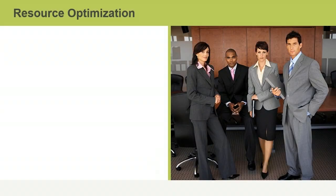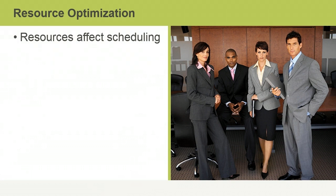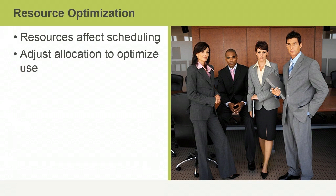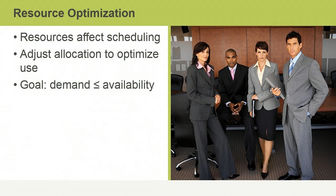This topic covers five tools and techniques used to develop the schedule. The first is resource optimization. The resources allocated for each activity can affect how activities must be scheduled. Resource optimization involves adjusting the resources allocated to activities to optimize both resource use and the schedule. The goal is to ensure that demand doesn't exceed availability, and you use this technique when resources have been over-allocated, are only available at specific times, or are limited in numbers.